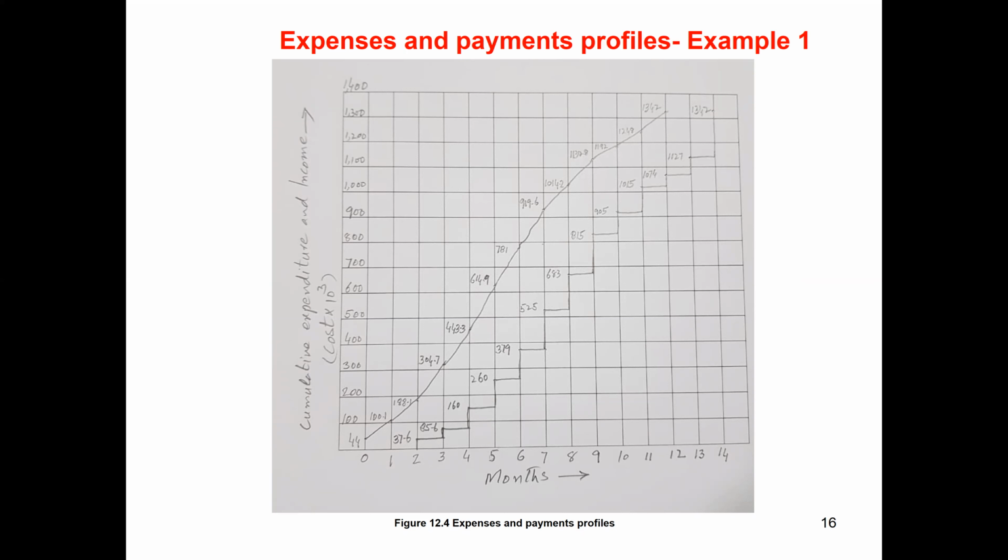So they first prepare the direct cost, and then in terms of percentage they increase those costs for the overheads or indirect cost, and then they add the profit also. So the contractor will multiply that profit with all those costs. It will be just one figure submitted for all the bill of quantity.